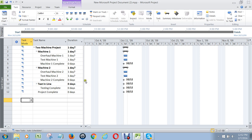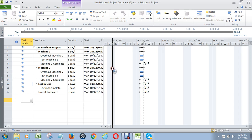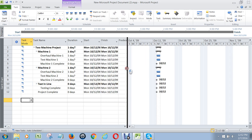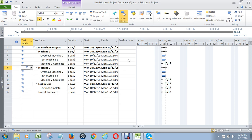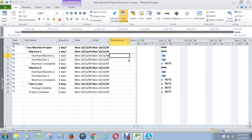So now that we've got all that in there, what we want to do is add predecessors to each of these tasks. These are immediate predecessors, meaning tasks that come immediately before the next task or the task that you happen to be on. The only tasks that will have predecessors are going to be milestones and then the individual activities — not the summary tasks.